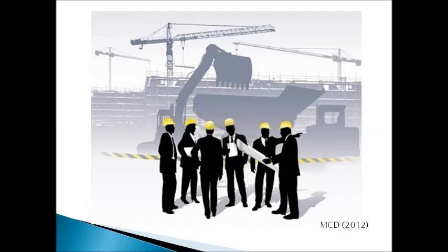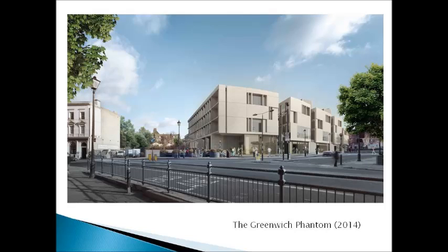Conference calls can be used by the design team to communicate between themselves, the facilities management team, the main contractor, or the project manager to keep information flowing and the project moving even when they are not available on site. Timed on-site meetings, follow-up meetings and focus groups enable the project manager to discuss the commissioning program with the design team and the contractors so there is no confusion or conflict. Setting time limits for the meeting also helps to keep people focused, preventing deviation from the topic and time wasting.